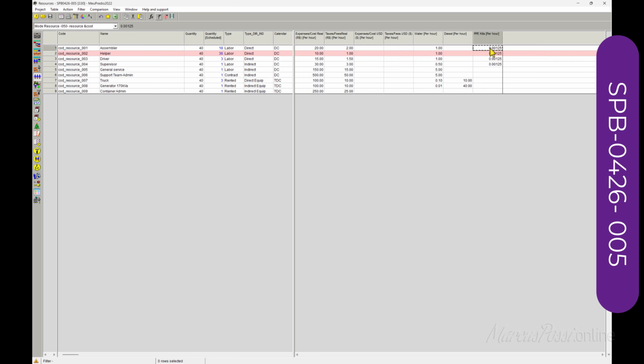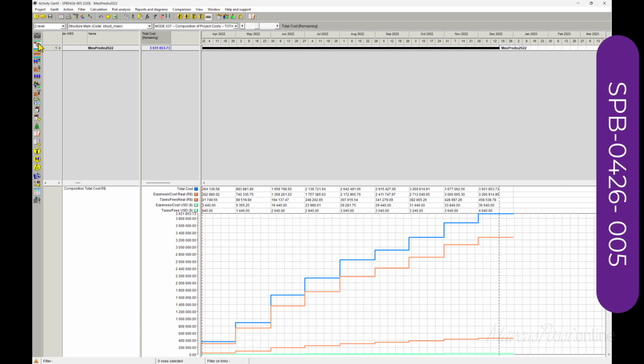After 800 hours, it will be out of use. So this indicates how, during projects, they consume, with the need of changing or giving another kit to each worker.